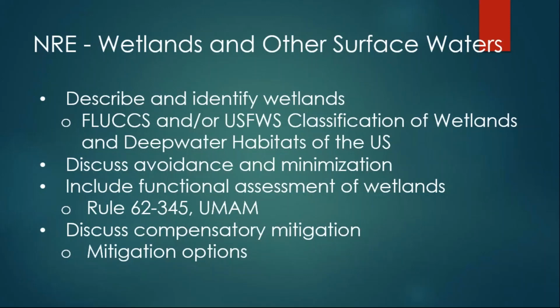Those mitigation options could be the purchase of wetland credits, working with the water management district for mitigation, and also, as a last resort, permittee responsible mitigation, where we identify a project, an area where we build a wetland to offset wetland impacts.